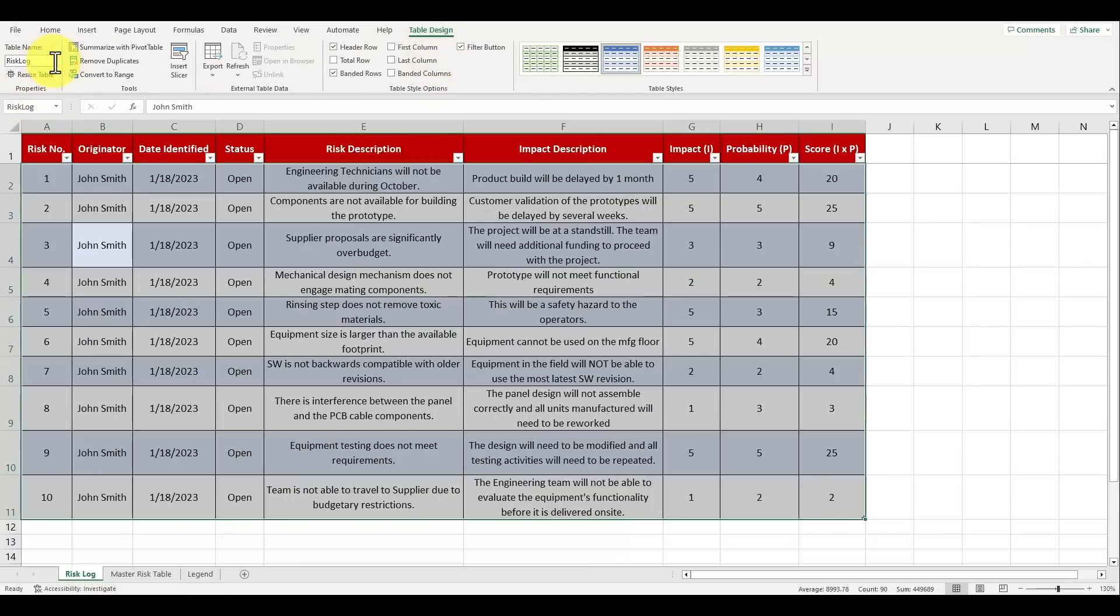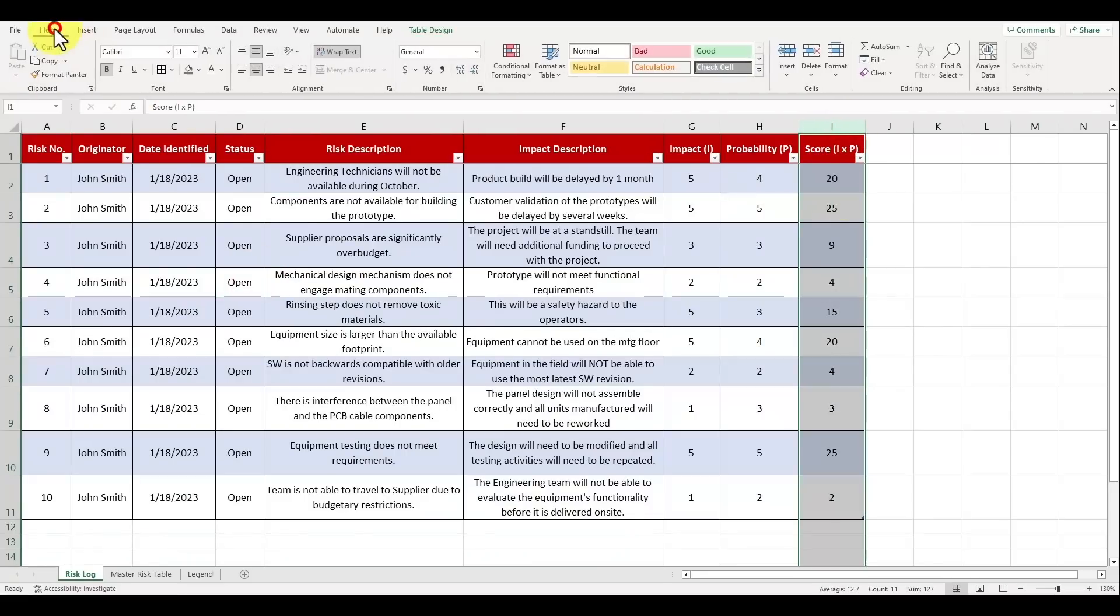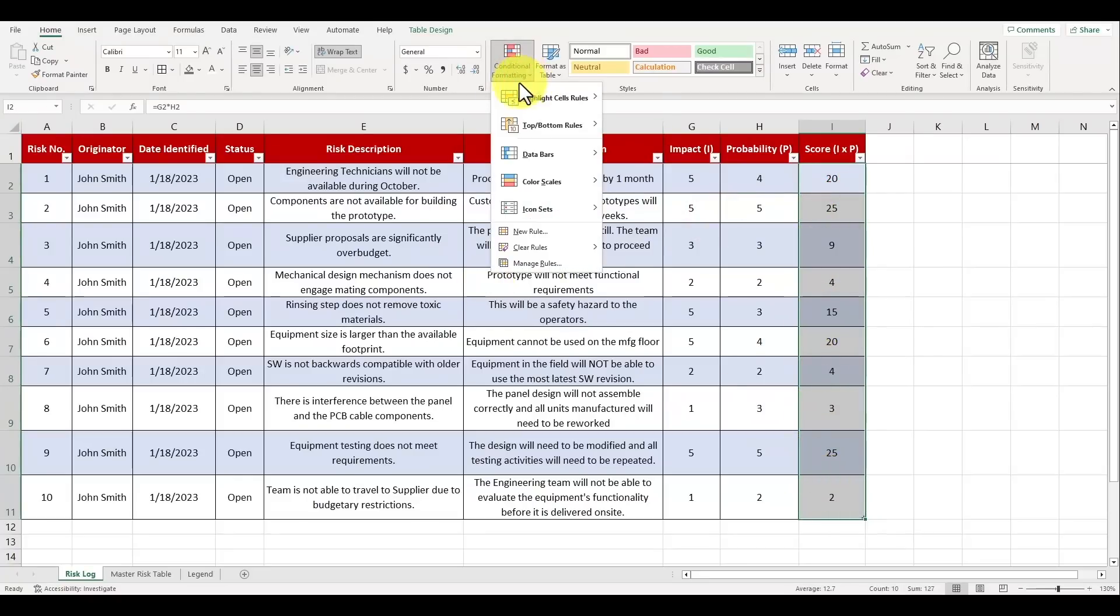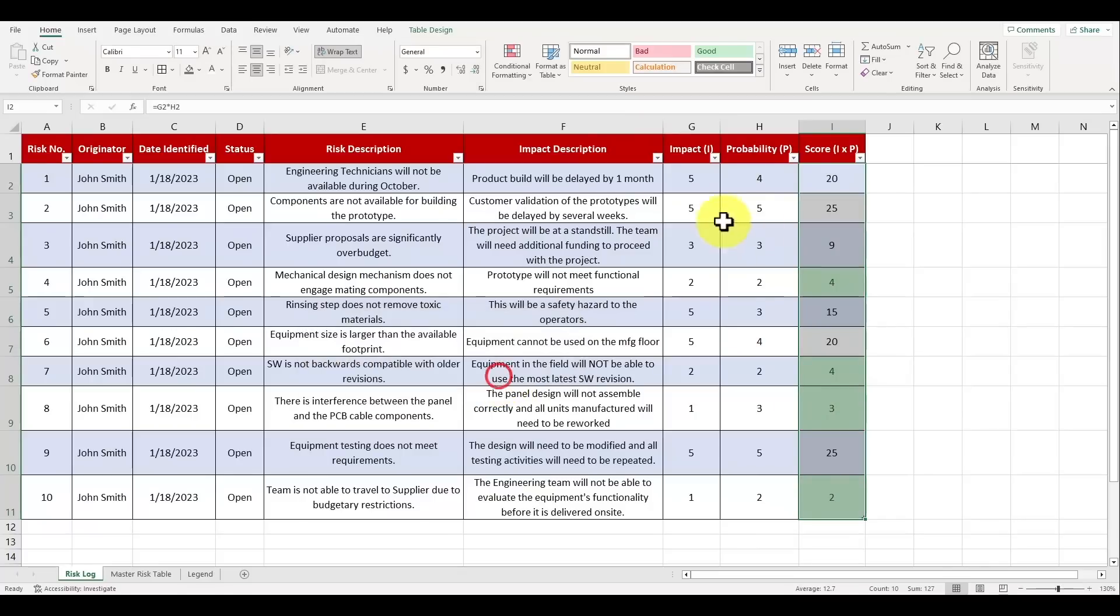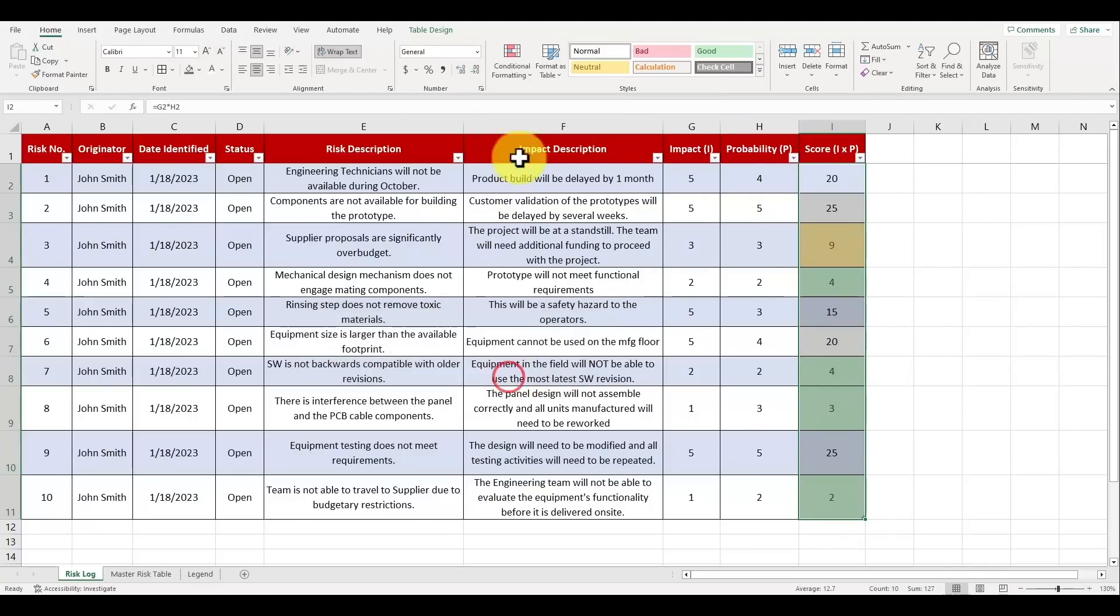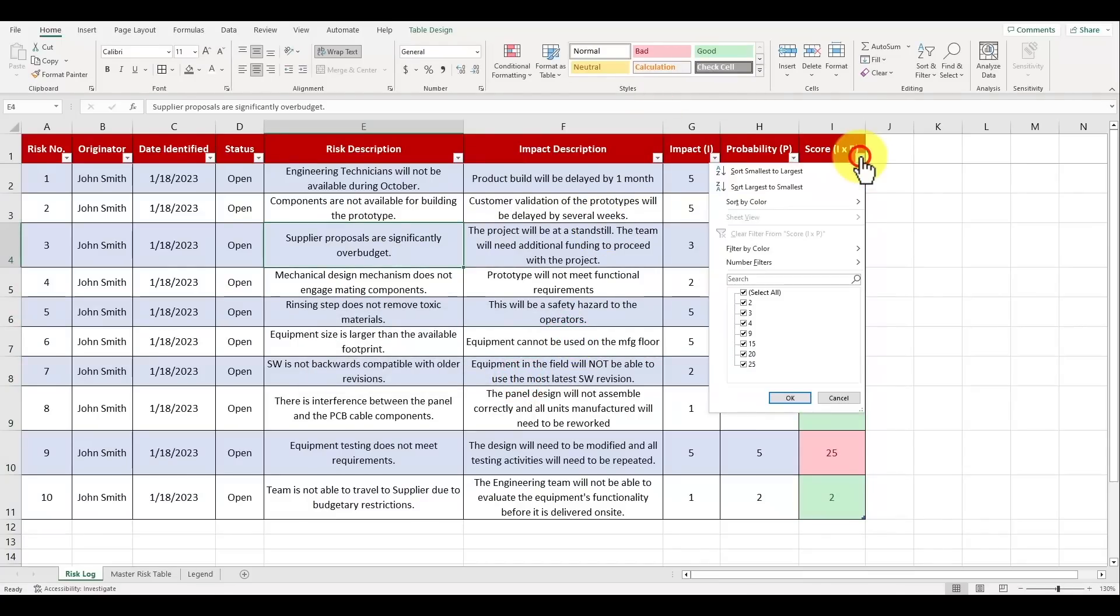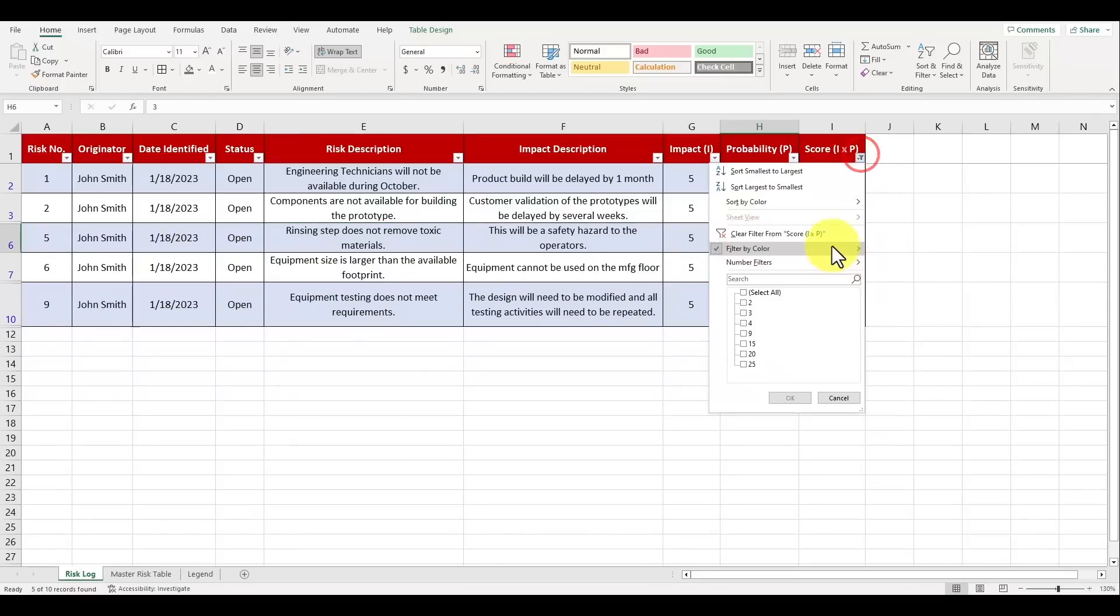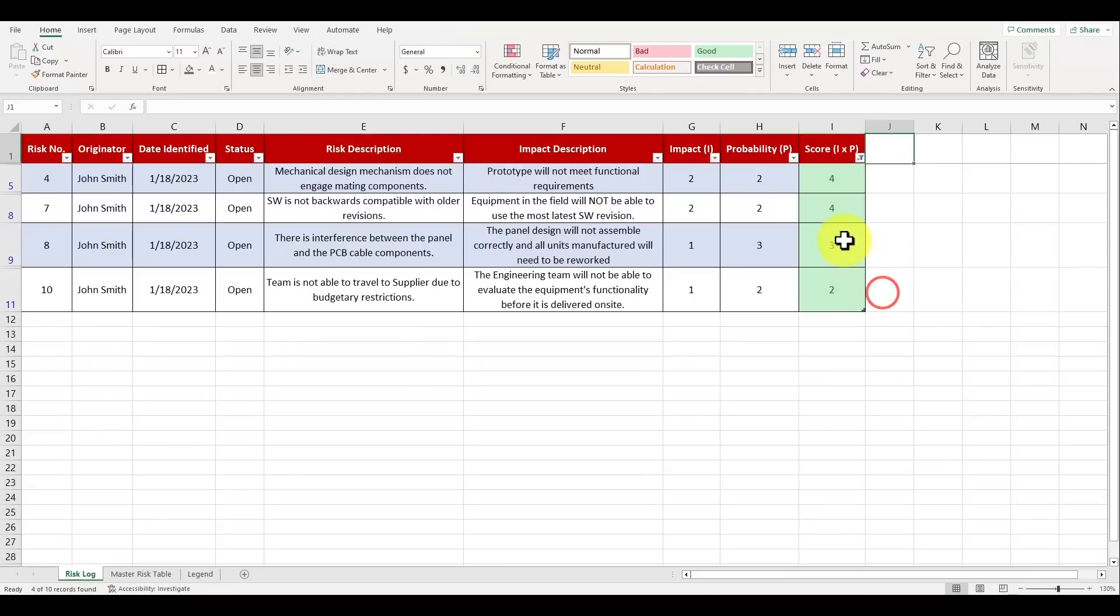So that it's easy to visualize the severity of each score, let's also apply conditional formatting to the score column using the same legend that we reviewed earlier. Highlight the cells from rows 2 to row 11 and select the conditional formatting button. Hover over highlight cells rules and click on less than. Format the cells which are less than 5 to be filled with the green fill with dark green text. Repeat the same steps to apply conditional formatting with yellow and red colors to your score column and it should look like the following. Now you can quickly filter your high severity risks based upon their color by either red, yellow or green. This is extremely helpful when you're reviewing risks with your team and upper management and you only want to review risks which have a medium or a high score.